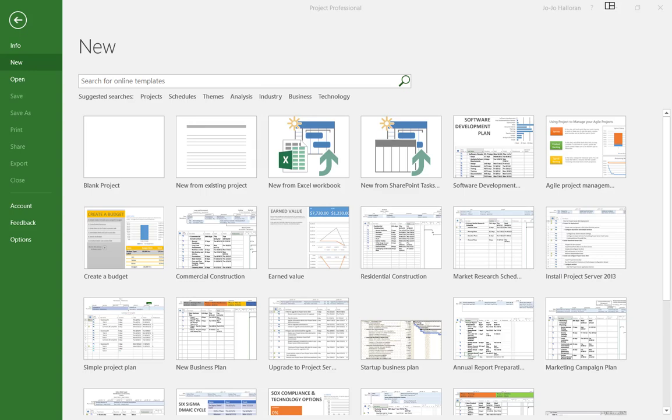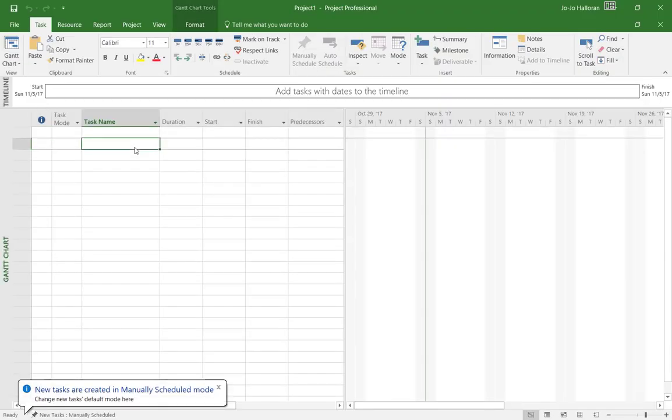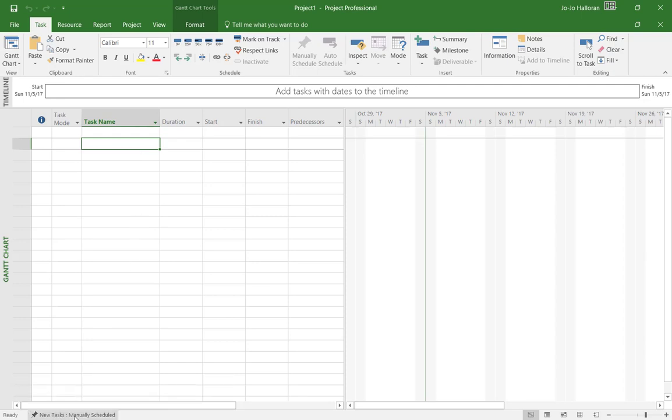All right, we are doing the Circling Back 1, Project 1, entering tasks on page 119 of your textbook. So the first thing we're going to do, of course, is have Microsoft Project open, and in the New section, we're going to click here on New if you aren't already there, and we're going to click on Blank Project here. Okay. And the first thing that we're going to do, remember we talked about this before, about tasks being manually scheduled. We don't want manually scheduled. We want to go ahead and do auto scheduled.